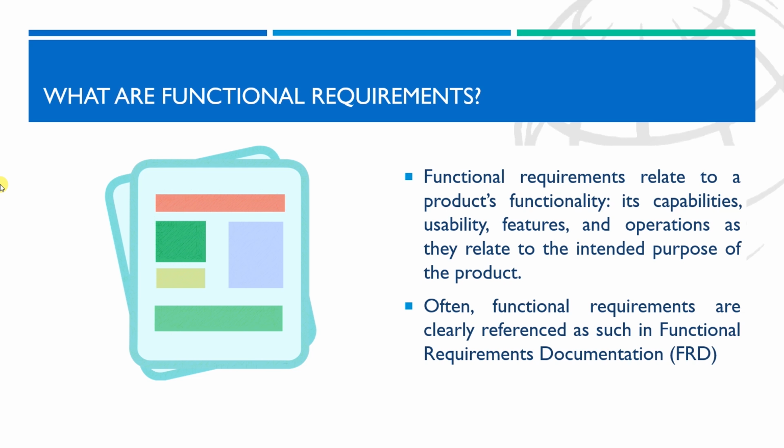Then, requirements are not limited to the window of time before production. Change order documentation, warranty documentation, etc. are useful forms of ongoing requirements documentation that occur throughout a project. For as long as you work with a client, the documentation is ever growing and ever evolving.